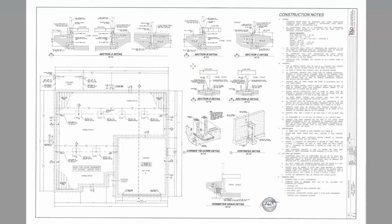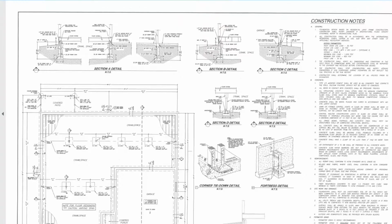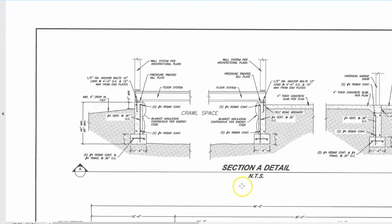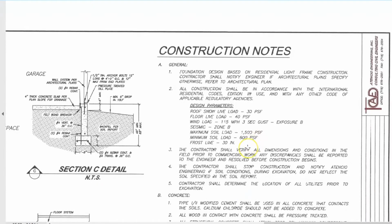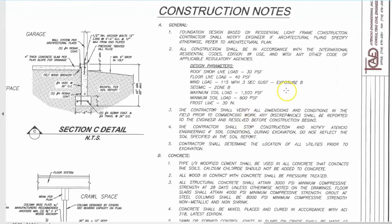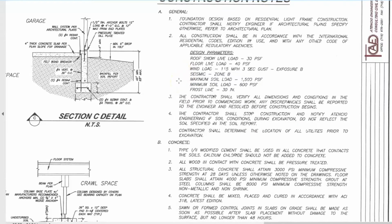So in the last section of the video, we saw that the lot has some expansive soil. Some lots have a lot of shale. Some have severe expansive soil. So it really depends on your specific location what sort of engineering plans he will come up with. But in this case, and actually I believe she, in this case, this is detailed instruction for the general contractor on the materials to use and how exactly to build the foundation given your specific lot.